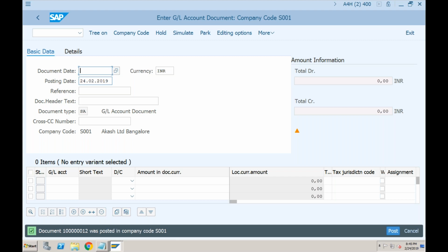Okay, so if I want to track each and every expense on the construction of the building, I will create one internal order. I will allocate some budget, and then I will keep on booking the expenses on that particular internal order. And as soon as the building is completed, let's say the total cost for constructing the building is around 50 lakhs. Okay, let's keep it 50 lakhs itself. So let's say 5 million. So you got the total expense of 5 million.